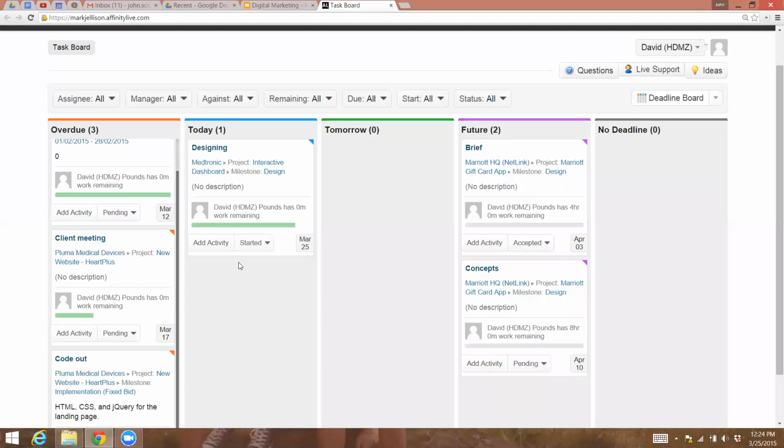If it doesn't get past David and David doesn't remember that he actually didn't spend 22 hours on a particular task, then what we can do is also have that level of approval before we go to the invoice process, where we can have a project manager or account executive come in and take a look at all the time people have logged, just to make sure that things look right.